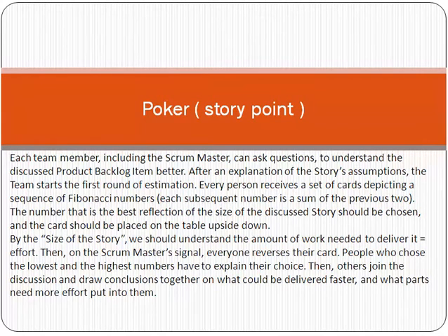like 1, 3, 5, 7, 8. So what is the concept here? For example, let's suppose there are three stories. Story means functional requirement. From the product backlog, the scrum team picks one story and compares it with some baseline story, and based on that gives points to the story. The story point is based on the comparison with the baseline story and the complexity level.